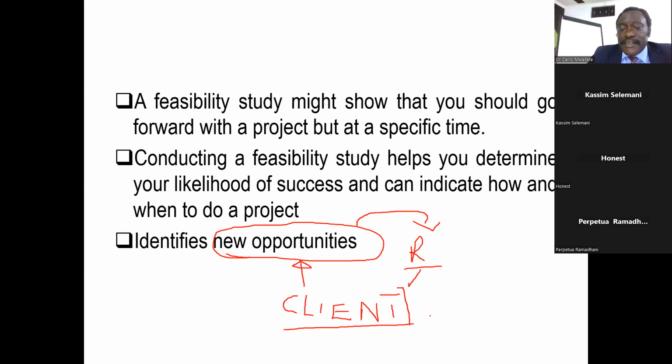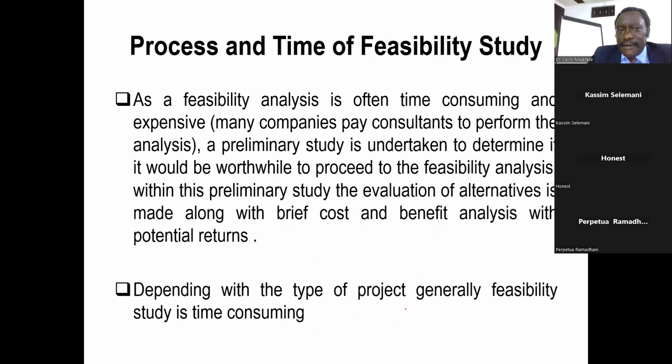Yes, Kasim. Now, any other comments about that? The time, if you have been participating in projects, how long does it take you to do the feasibility study? Of course, it will depend on the type of project you are doing. If you are a consultant and you want to produce a feasibility study, it's not less than 3 months. This is my experience, not less than 3 months.